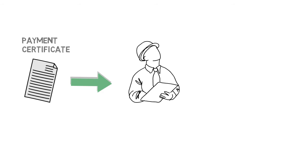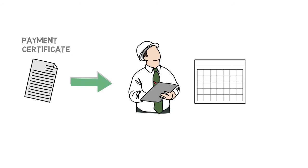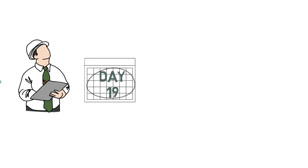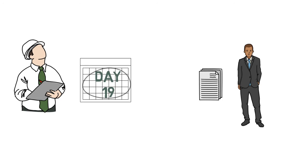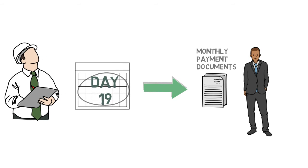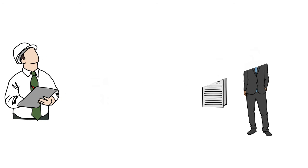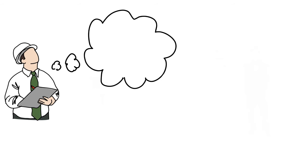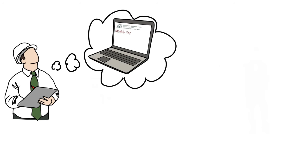Once the payment certificate has been issued, the head contractor has until day 19 to give the BMW project manager the monthly payment documents. These documents comprise a progress payment instruction or PPI, a payment report, and a statutory declaration.